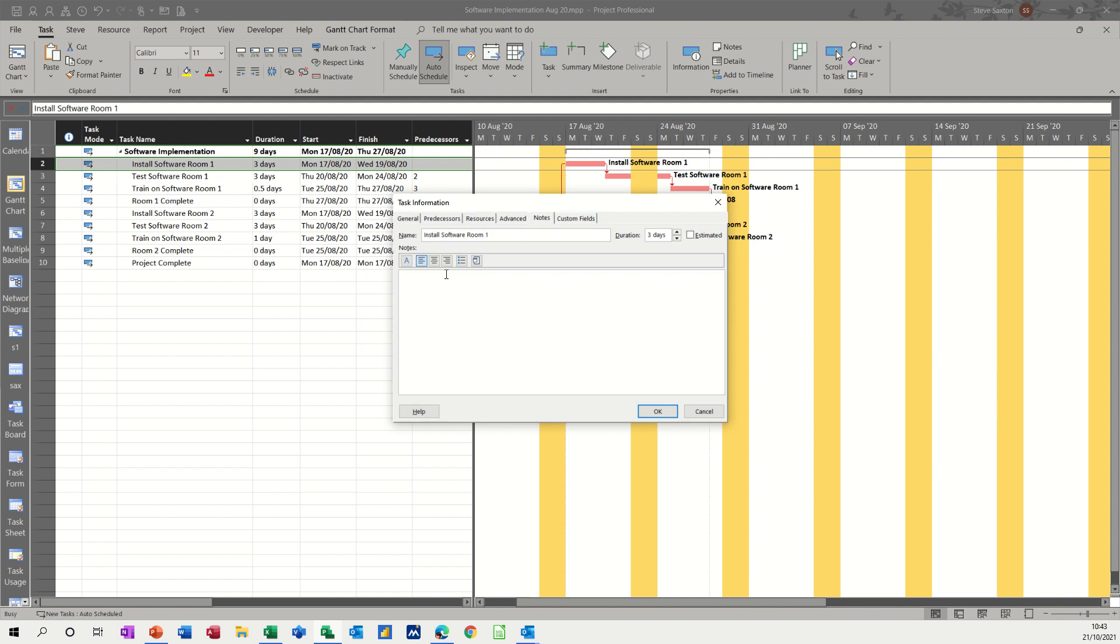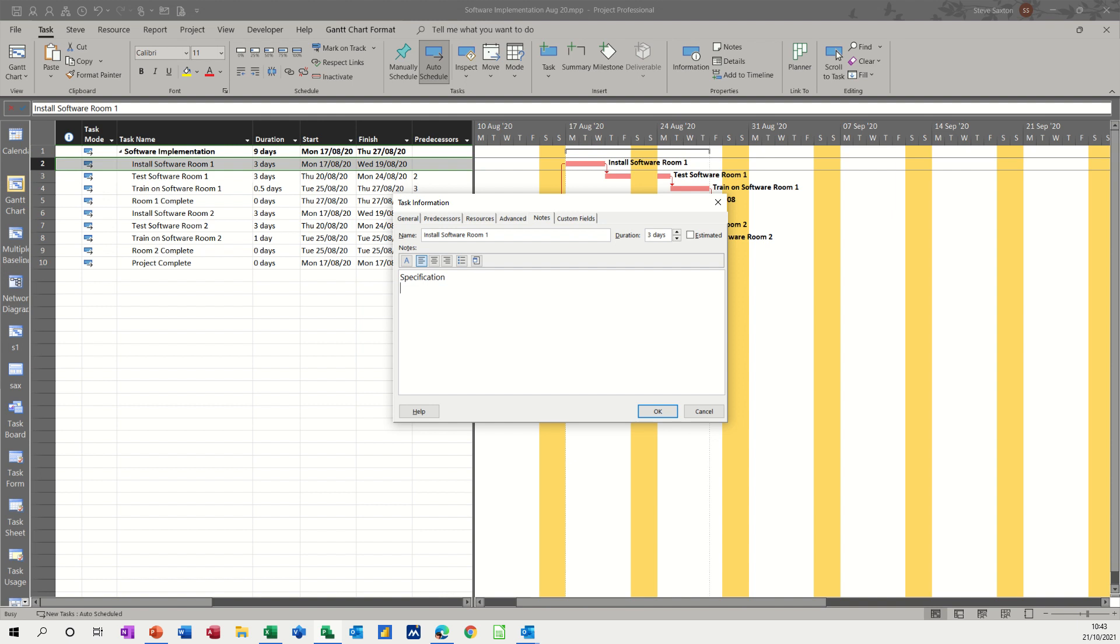What you need to do is put a little title, because when you embed something, it doesn't show anything in the information column other than an apostrophe and a little note symbol. I'll show you what I mean in a second. So if I just give it a title, call it specification. And then you basically click on this icon at the end, insert object.